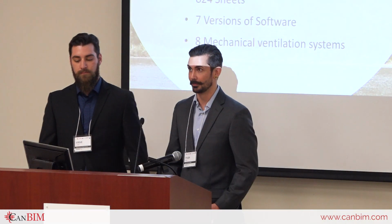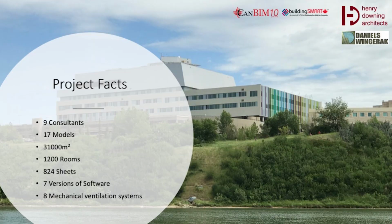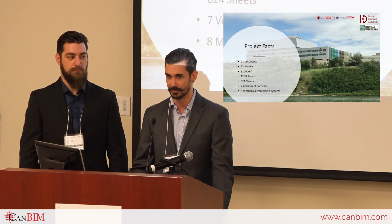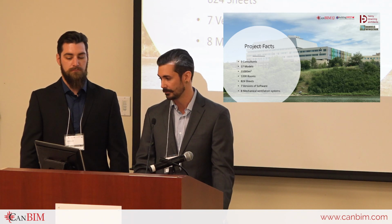All right, so let's get started with some project facts. There were 9 consultants involved in this project. We had teams from Ontario, Oregon, Washington, and Saskatchewan. We had 17 models making up our BIM atmosphere. The building included over 31,000 square meters in building area with over 1,200 rooms. It took 824 construction document sheets, excluding specifications, to compile the drawing set. We used 7 versions of software, and there were 8 mechanical ventilation systems, which Steve will touch on a little later on in the presentation.